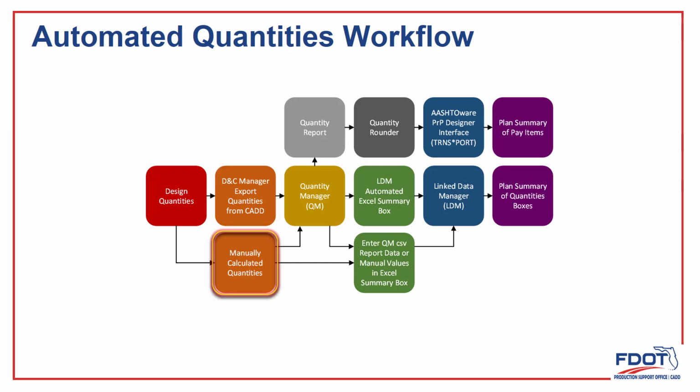Not all quantity data can be applied to specific design elements, so those items must be manually entered into the Quantity Manager database. The Quantity Manager database should be used to store all quantity data for the project. This data is needed to generate the plan summary of quantities and the summary of pay items.